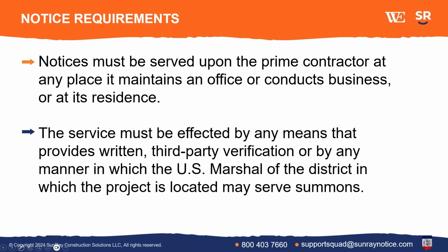If the answer is yes, you're generally going to be okay. But again, to protect yourself, it's best to comply with what the statute requires so you don't give the other side that argument. So essentially, you hire a process server and serve it that way like you would a lawsuit. That's the safest way. But there are other ways that can apply. Next slide.